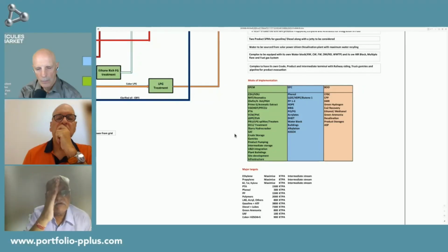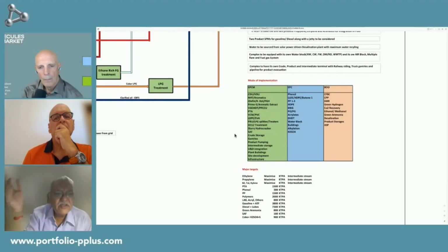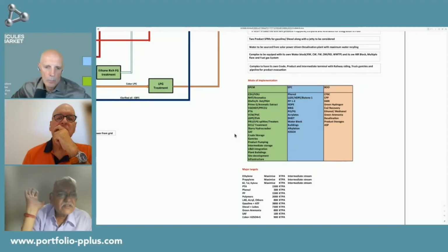That means if I look into the total implementation duration, this is the minimum duration which can come through this particular route, because we do not believe in the concept of completing engineering and then implementing. In India, we always believe in concurrent implementation. That means we keep doing engineering, we start construction early. Because in India, the critical path is always construction.